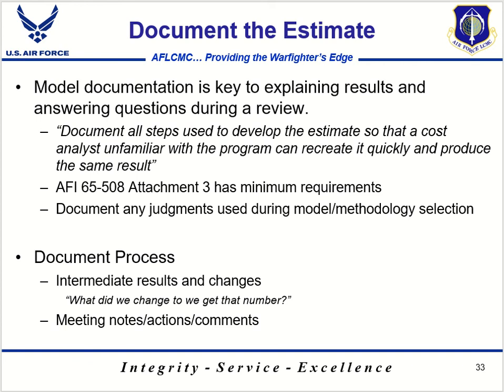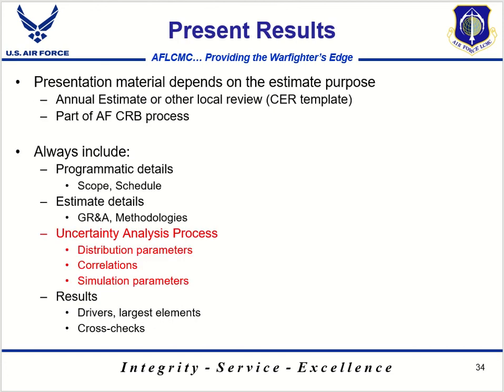You always want to document the estimate well. This is not unique to the risk assessment, but is an important part of the general estimating process. In terms of the risk assessment, though, you specifically want to document the risk assessment process or the ratings that you have concluded, as well as the assumptions used in defining those distributions. This will help you remember what you did, as well as help you prepare to present your results. And you'll typically present the risk analysis results when you present the rest of the estimate.